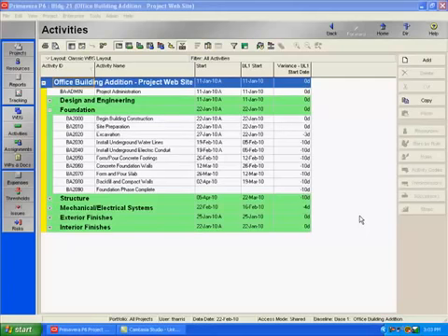In this tipcast, we will be demonstrating the use of thresholds in Oracle Primavera P6. Thresholds can be a useful technique to assist you in monitoring parameters such as start date variance or total float. You are able to specify a lower and/or upper threshold value for your selected parameter against which your project data will be evaluated. P6 will generate issues for any data elements that exceed your thresholds. You can then use issues as a vehicle for notifying project participants about the thresholds and then determining and documenting corrective actions. We will discuss issues in more detail in a future tipcast.